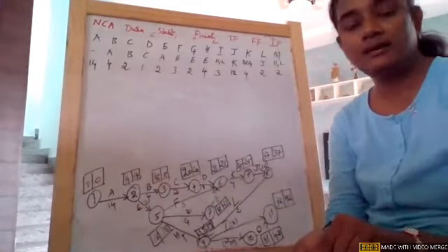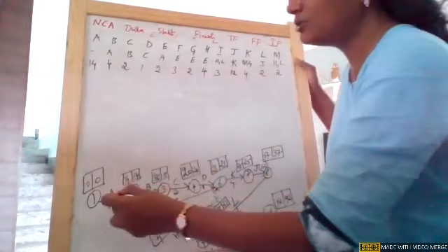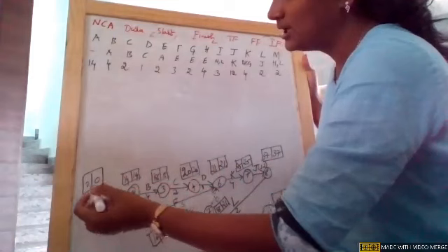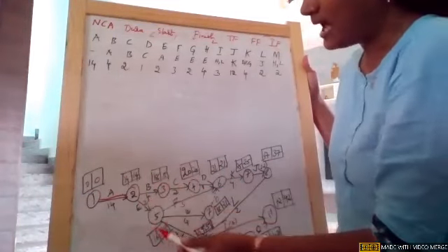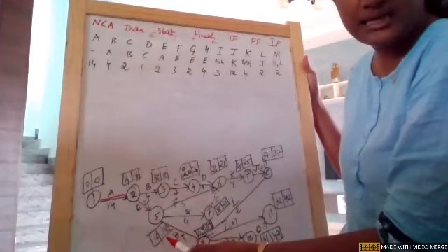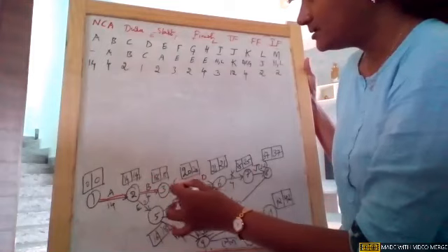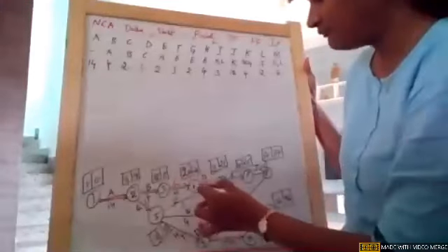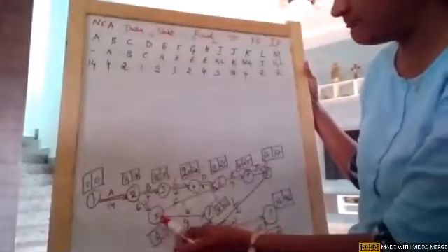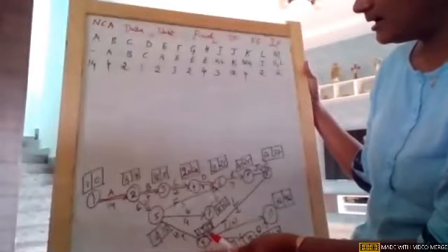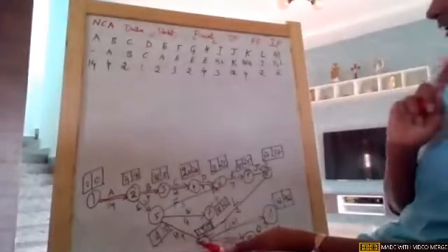Now see the path where earliest and latest times are matching. And that you need to mark as critical path. So you see from 1 to 2, it is a critical path. 2 to 5, I can't make it a critical path because they are unequal. So 2 to 3, then 3 to 4, then 4 to 6. The rest all are not critical paths, girls. You can see 5 is not critical path. 7 is not critical. Okay, 7 I wrote twice.